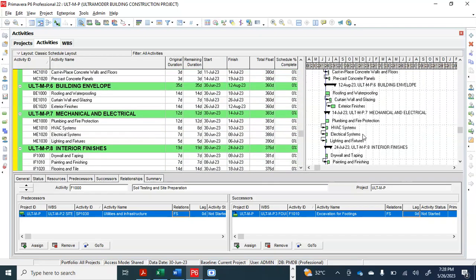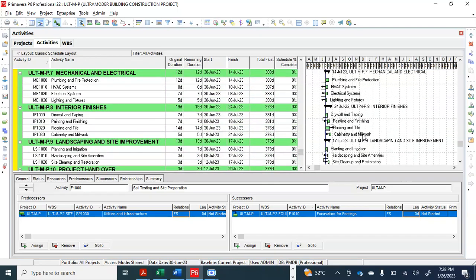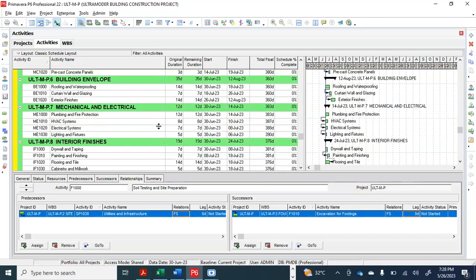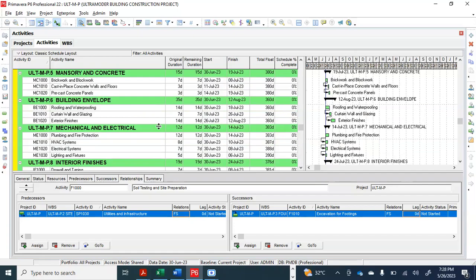So our activities are linked together. You can easily explain this to management. If they call you for explanation, you explain this one, this because of this. Now this one because after this the concrete, I mean the block work, gets dried. We need to wait for 2 days. You show them 2 days. After 2 days, then this one will now start. That's why it's an application.